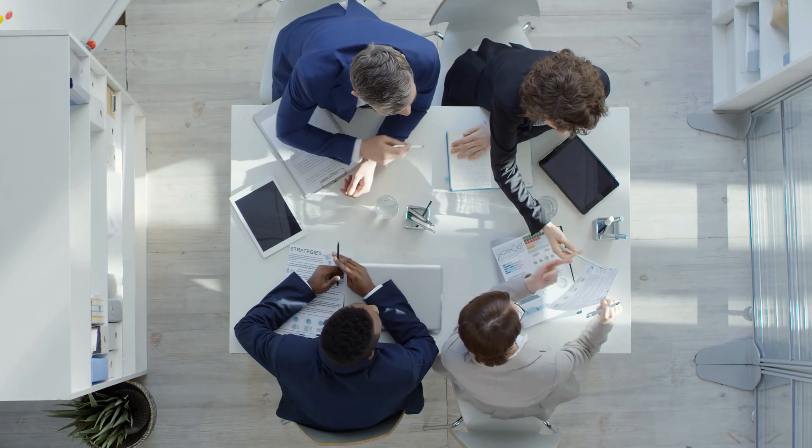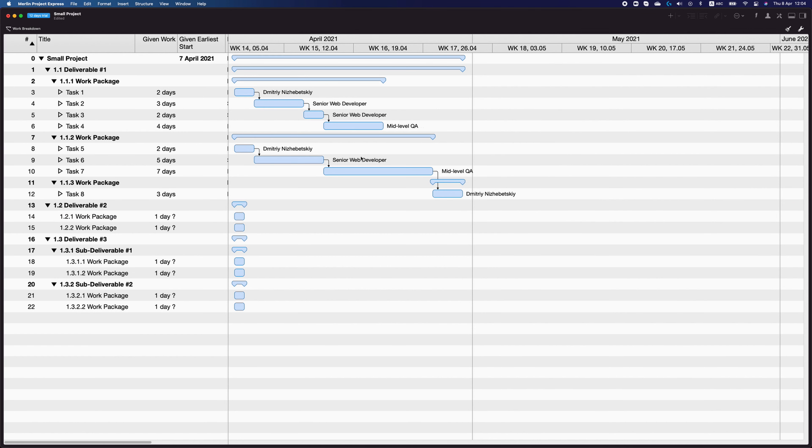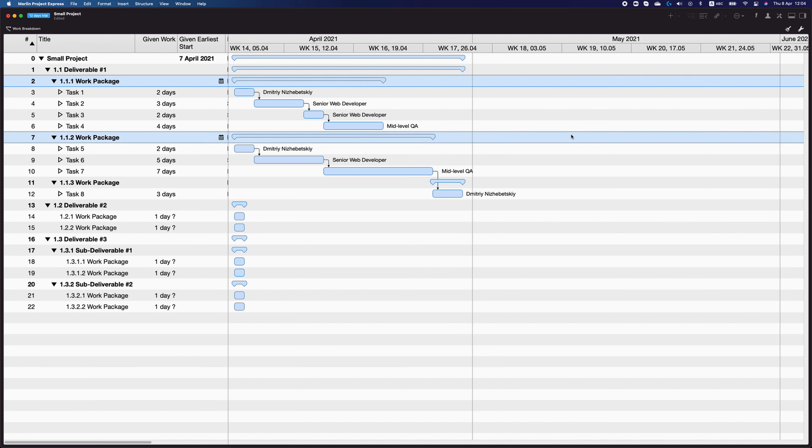Now it's time for the first sanity check. You've created a long sequence of tasks with all dependencies and durations. If you have a strict deadline, check whether you meet it. If clients are okay with a long sequential schedule, stick to it — it has the least risks and communication overhead. But in the real world, clients want results fast, so you break the schedule into parallel threads of work, applying compression techniques.